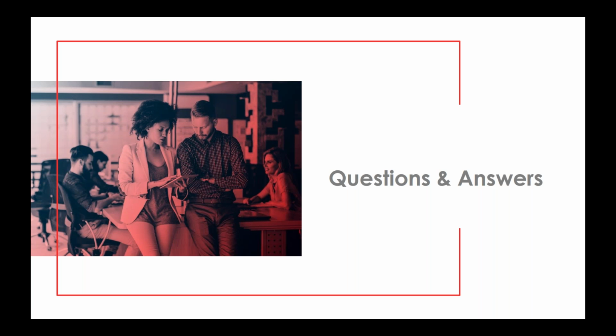Fantastic. Let's see here. Next one we got here is on portfolios. Can a project be in more than one portfolio? Yes. A project can be in more than one portfolio, but only one portfolio will be displayed on the project form. All right. Looks like we got a couple more questions here.